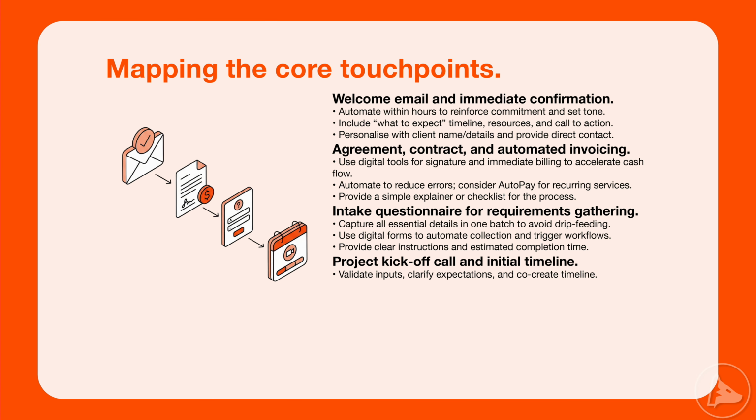Intake questionnaire for requirements gathering. Once payment and paperwork are done, send clients to a single intake form. This should capture everything you need in one go. Goals, technical requirements, access needs, brand assets, stakeholders. The rule? No drip feeding requests. Batch the questions up front so delivery can start without back and forth. And for sensitive data, don't ask for passwords in email. Use secure uploads or ask them to add you as a collaborator wherever possible.